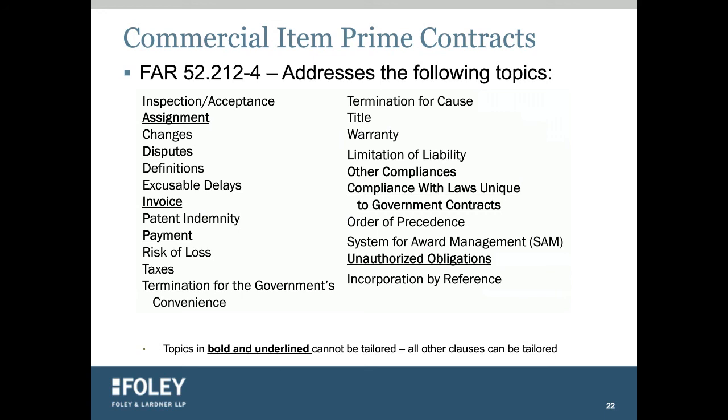Good luck with that one. You can't redline the clauses. The only negotiation with the government is whether the clause does or doesn't apply, and if it applies to you, you're stuck with it. There's an exception there, and that's this clause. The clauses that are not bolded and underlined can be tailored under FAR Part 12.